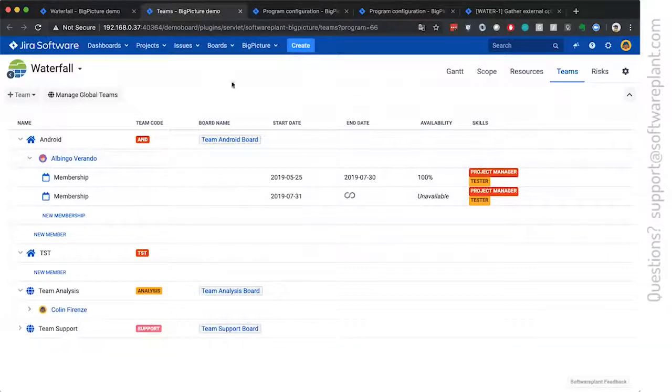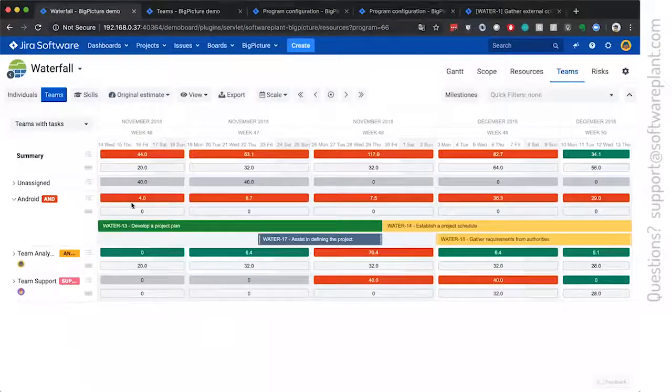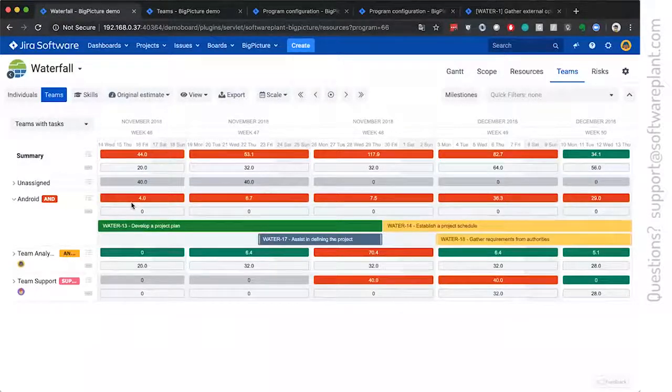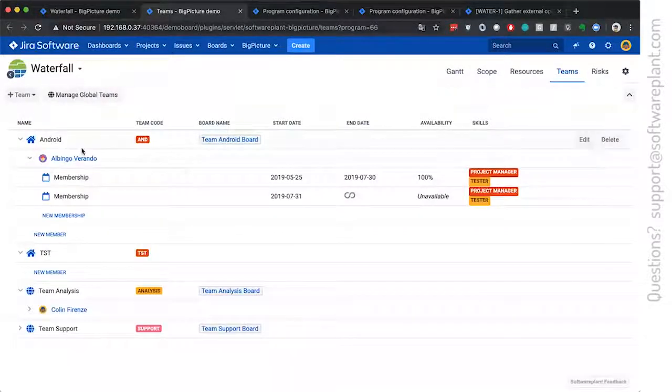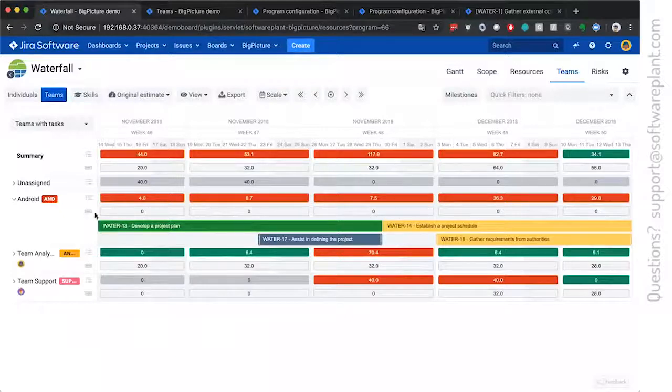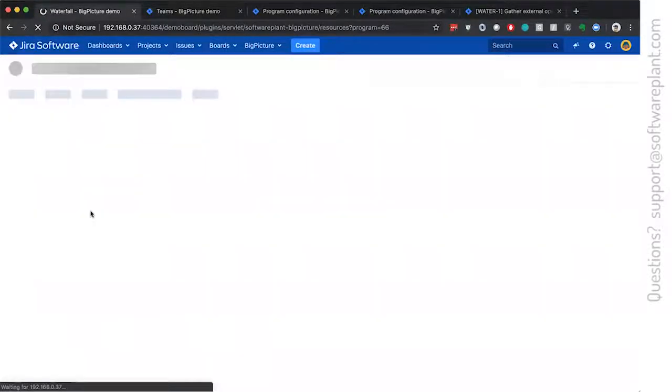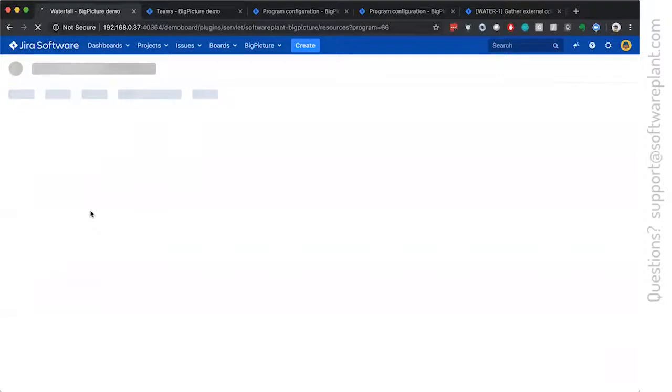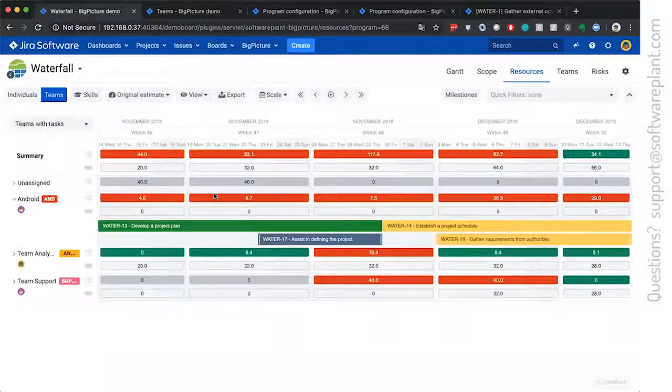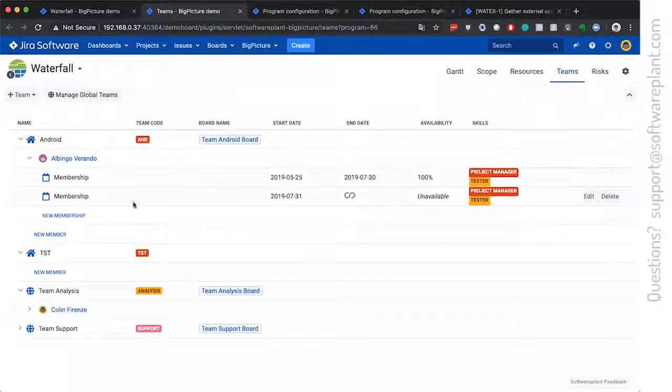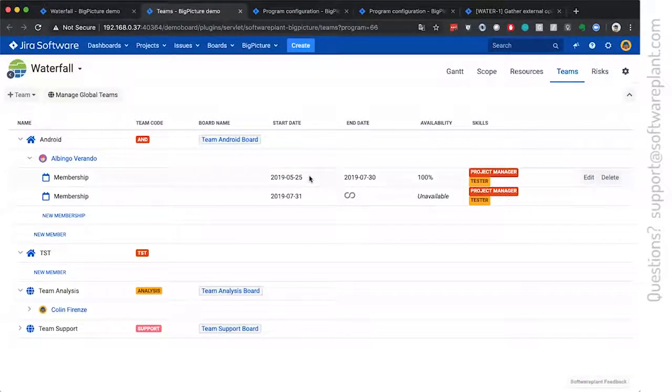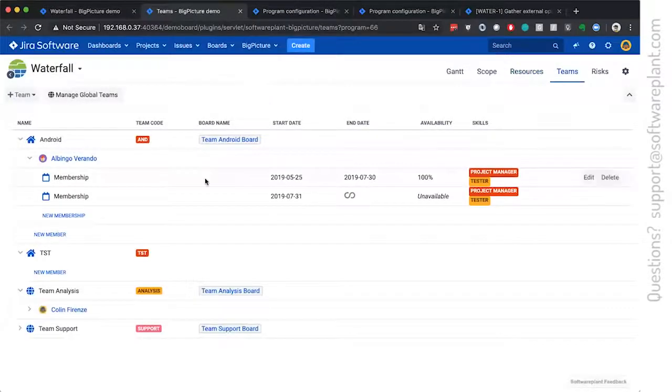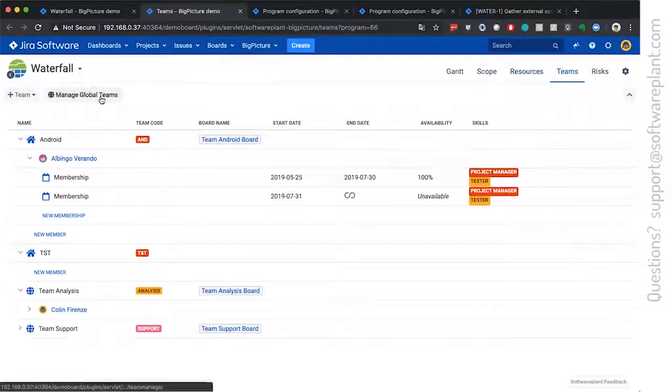And this has direct impact on the capacity of the team because if I have the Android team, we have zero hours of capacity. This is the capacity row. And this is because Albingo is joining the team on May 25th. But there we have also global teams.